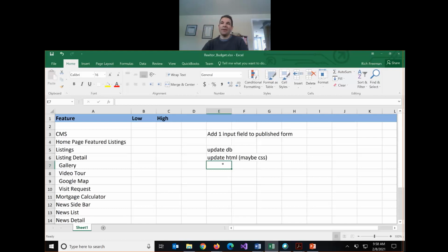Right, we'd have to add that to the code. You'd have to update the processing logic, right? So now we have a new field that would have to go in our insert. You'd have to test it. If you were saving a new field, it means whatever page we're showing the registrations to in our customer, we're probably going to have to add it for output. Because why would we save a new field to the database if nobody could see it? Add new field to output page.